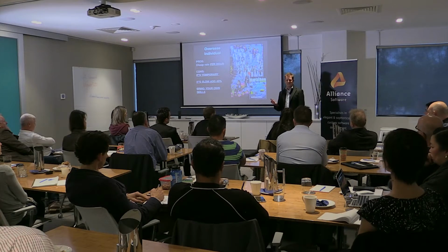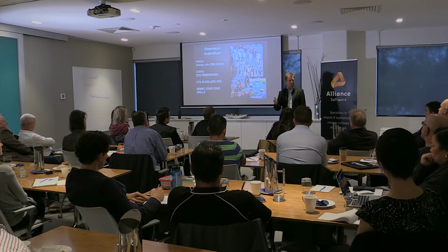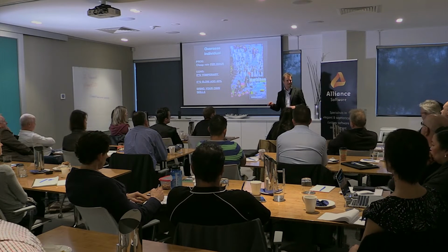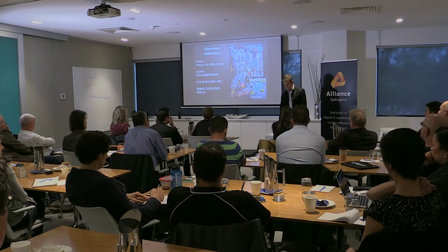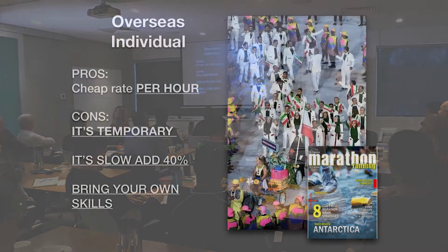Just on the dollars, most of the developers will work in US currency. So although they may give you a fixed price, just consider there's going to be variations in the currency, so your project may end up being more expensive or less, depending on the currency fluctuations.